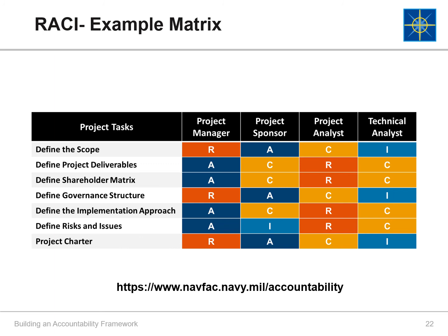Some things to keep in mind. You have to have at least one person responsible for each task or it won't get done. You can have more than one person responsible for a task, but only one person should be accountable, otherwise it's too easy to pass the buck. The same person can be responsible and accountable.